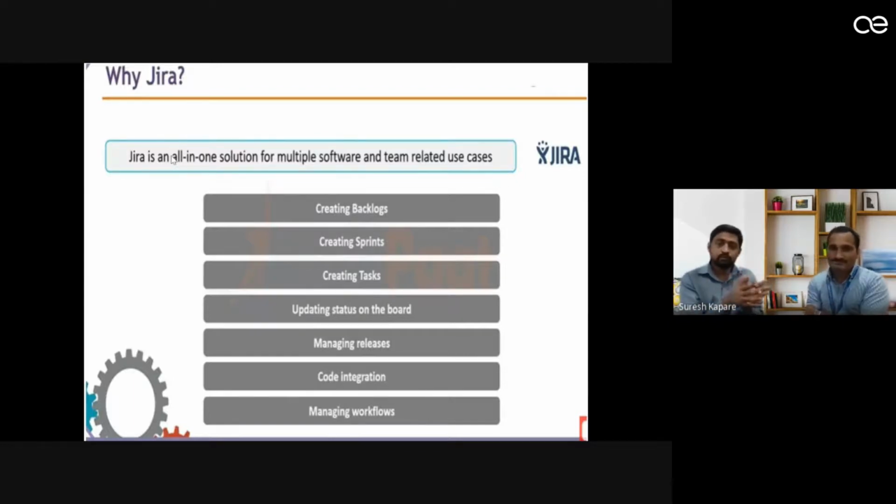So backlog is what we need to work on. If we tried to solve something and were not able to complete it, it goes back to the backlog. But also the activity or task which we haven't started is called a backlog. So initially, whatever we have created is like a backlog.